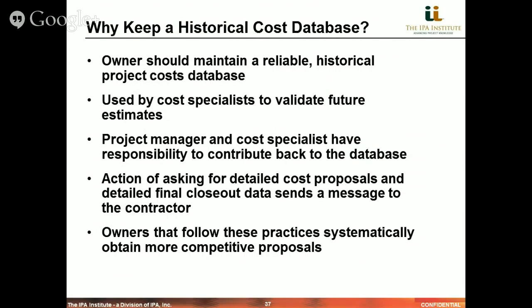And coming up with the cost and the schedule for that particular owner to do that project is one of their responsibilities. And this database is used by the cost specialists or the cost engineers in that validation process that we spoke of at the very beginning. Without this database, any form of robust validation is much more difficult. You're relying on outside data or data from third parties that you really are not sure how accurately they reflect your company's performance as a mechanism for measuring that cost estimate accuracy.